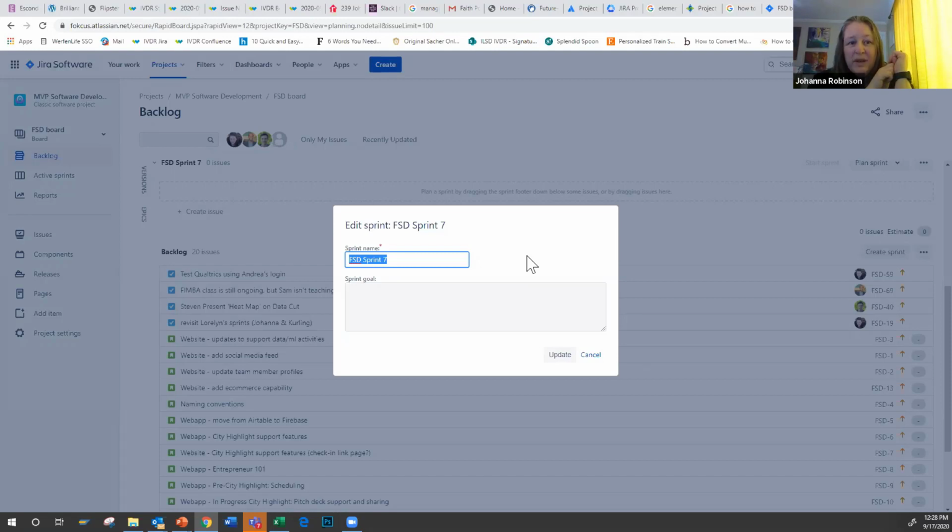And it's usually 1 or 2 weeks. So what you want to do is take that big list of activities that you can add to as you learn things about your project and figure out over the next 1 or 2 weeks, what do we think we can accomplish? And so then you create this thing called a sprint.